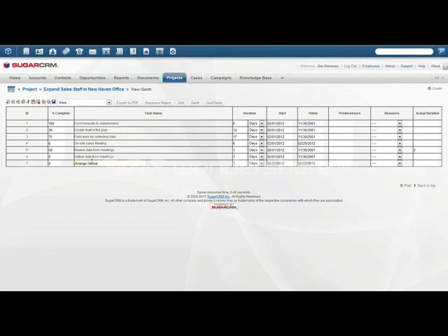Arrange my venue. Now this is a predecessor. I mean, this is part of the on-site sales meeting. To specify task dependencies, for example if one task has to be completed before another task, so before I can complete my on-site sales meeting, I have to arrange the venue.